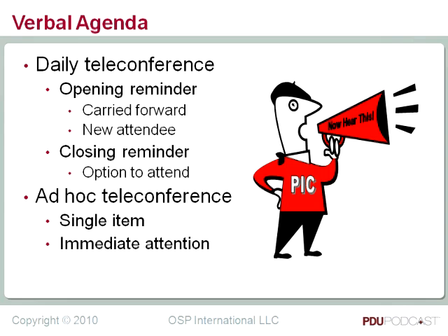And let me go back for a moment on the daily teleconferencing when I mentioned there's a closing reminder. It lets everybody know what's going to be covered the next day. When I was at one manufacturer, we were actually having daily teleconferences, and at the end, the PM would say, and tomorrow we'll be looking at how the time is being managed well and by whom. Well, certain individuals didn't really need to attend, so they knew that's what's going to be covered, so they didn't bother to attend the meeting. So once again, the PM's demonstrating, I'm concerned about your time, your participation. It's really not something you need to be here for, so that individual knows that they don't need to attend. And it tells participants that this PM really knows what they're doing when it comes to managing the time, the agenda.